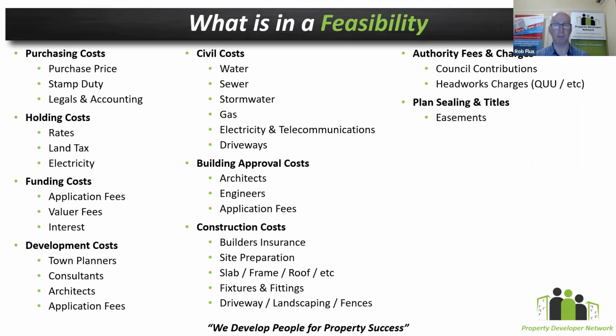So if you have not prepared for this very early, and some of the elements that you need to capture, you need to have done months in advance because of the lead time involved. It can blow out your timelines massively when you're at peak debt. So your holding costs blow out massively.